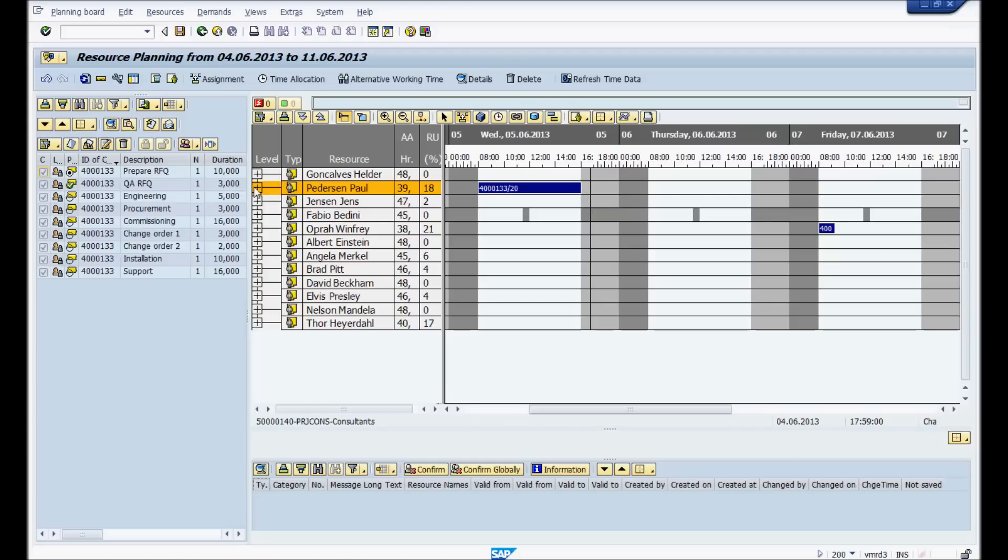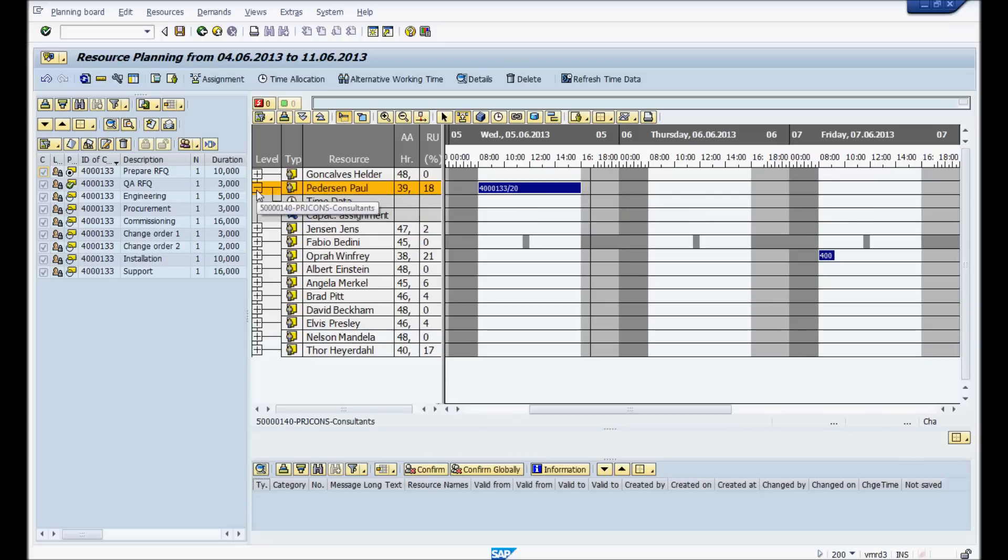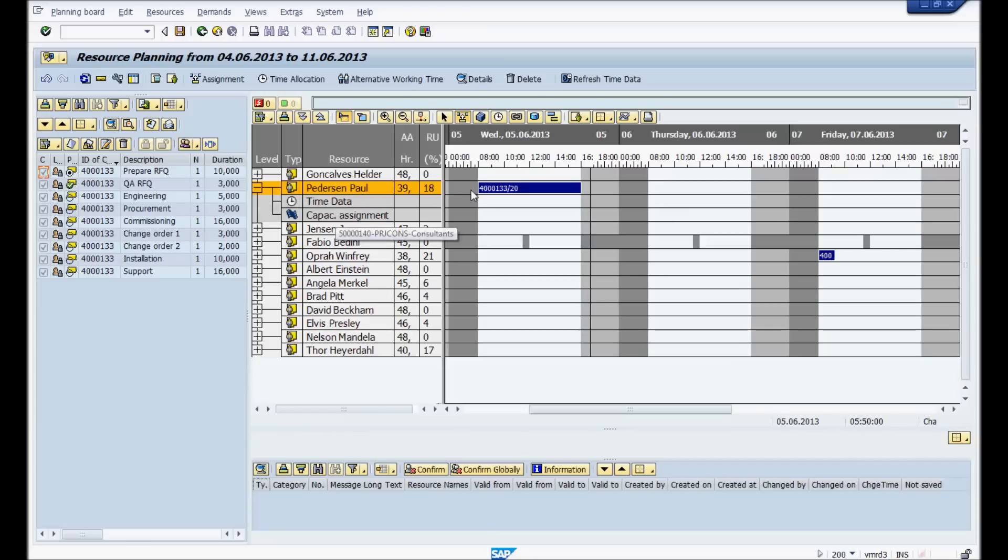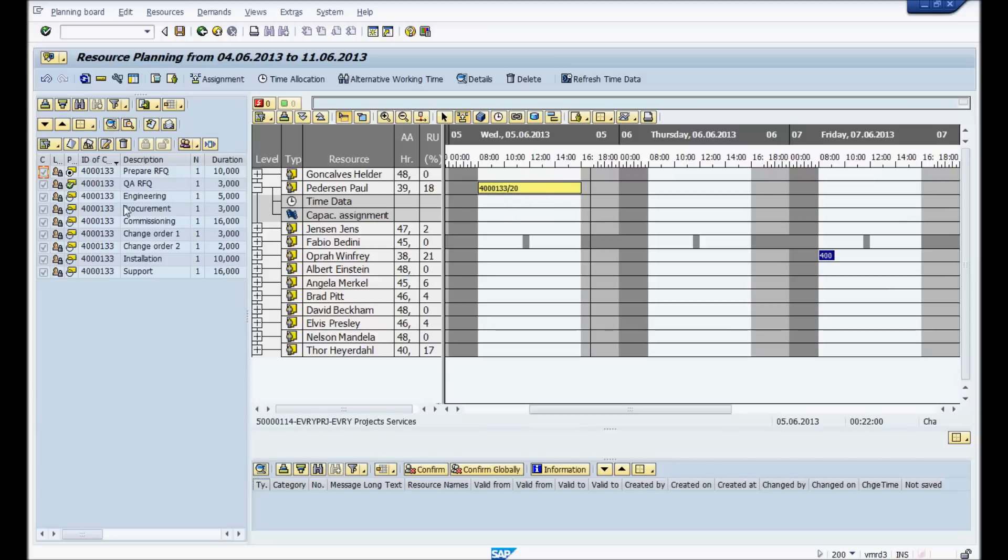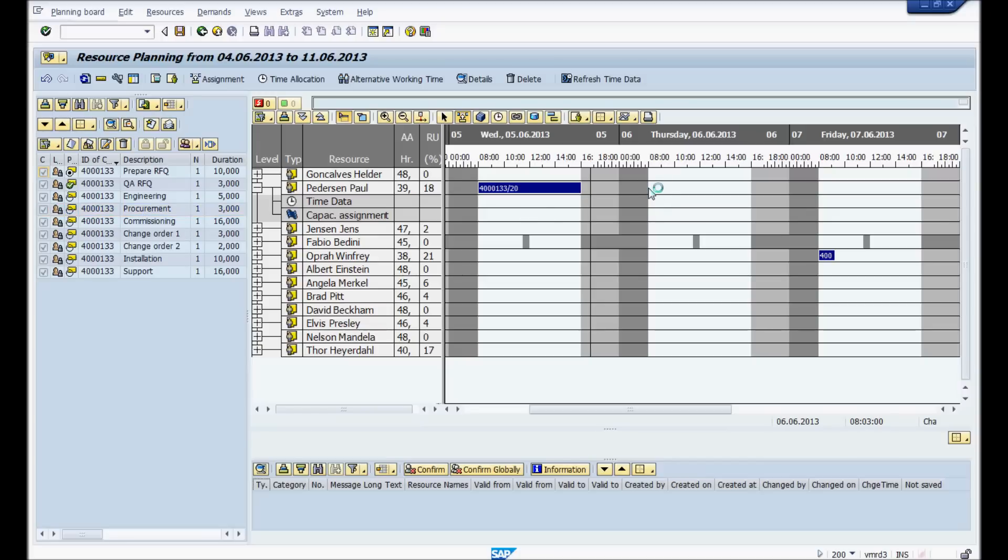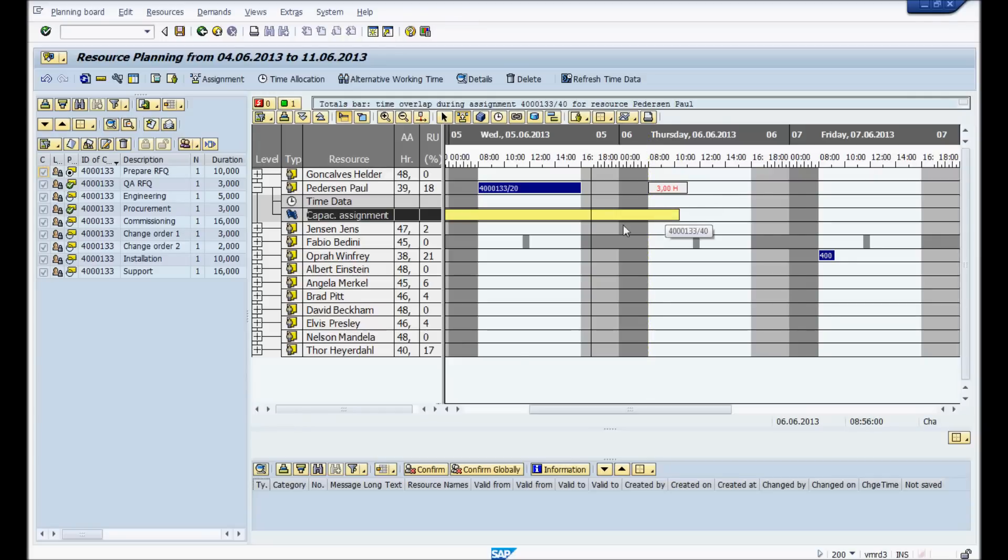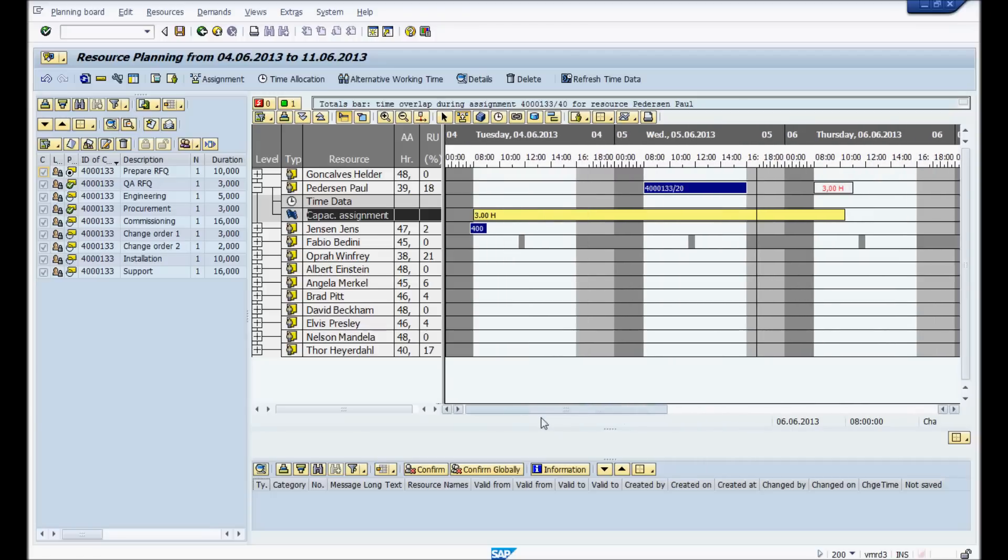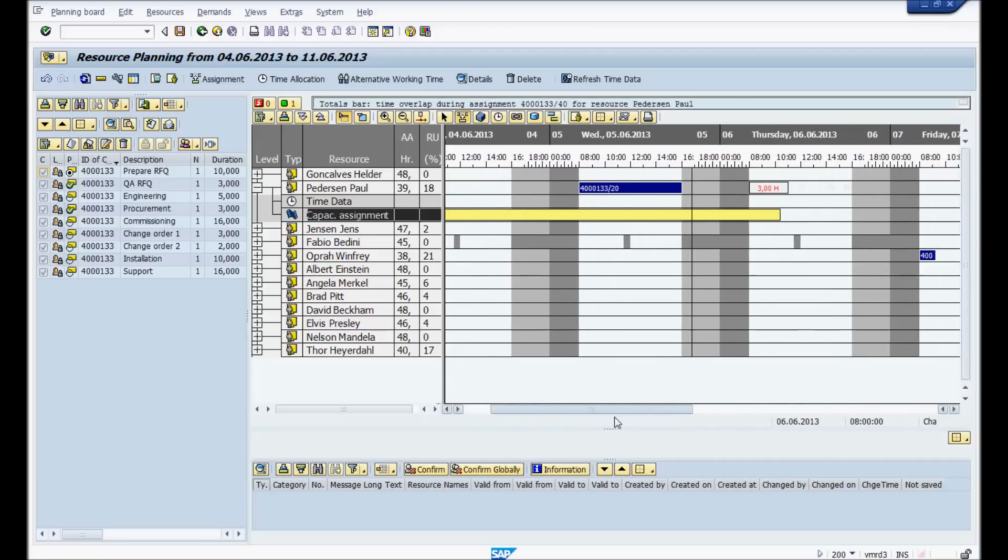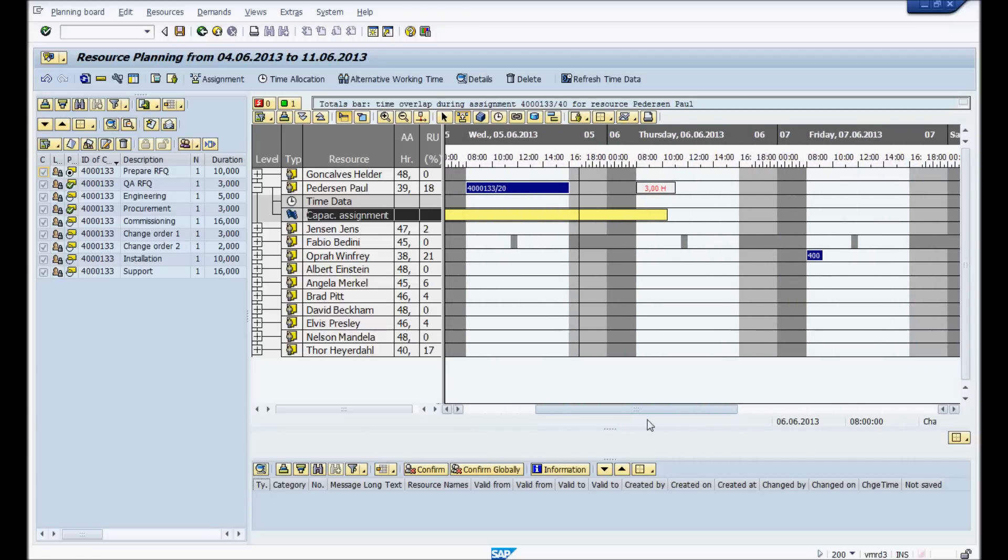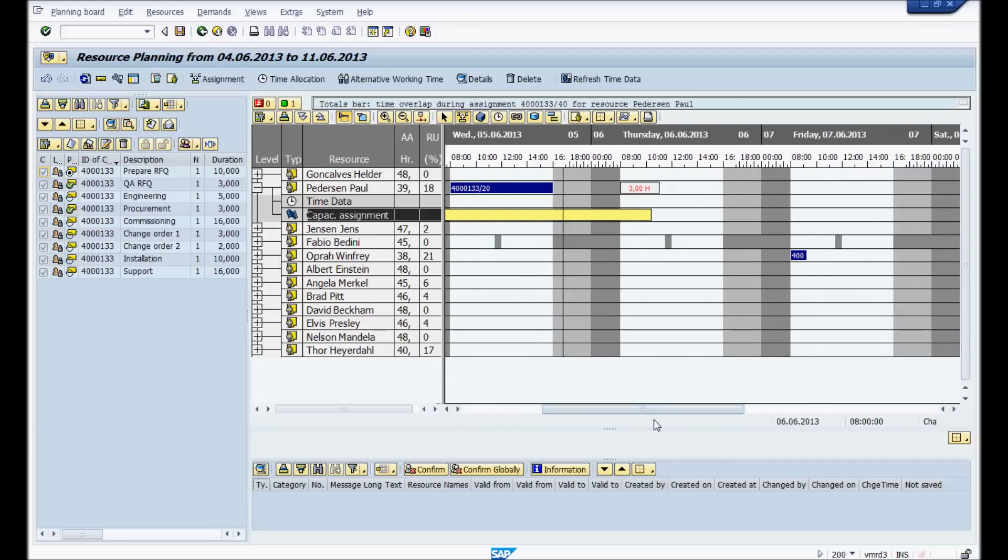Another thing you could have is you could have a thing called a concrete and capacitive. So here we made the operation is actually going to take longer now to do, but what we could have done instead, we could have taken an opera. I'll give you an example. Instead of making it concrete, concrete means it needs to be done between this time to this time, eight to 11, no flexibility. And then capacitive means, look, just finish it by end of day Friday. So here I'm going to put it into the capacitive and you'll see that it can be started from beginning of the week until now. So that's an example of capacitive.